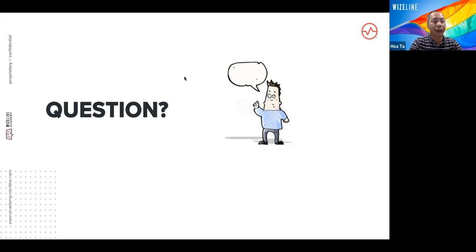Now let's come back to the question from Cesar. Do we need to choose one between commitment planning or velocity planning, or can we do both? Actually, we can do both. For the first sprint, we cannot make it velocity driven, just because we have no velocity. At that point, we don't have any numbers to compare to. So we need to go with the commitment. But for the next sprint, we need to follow both.